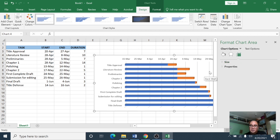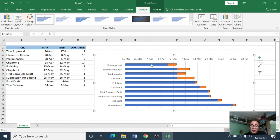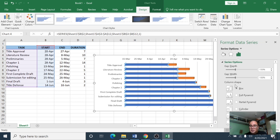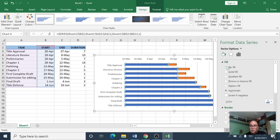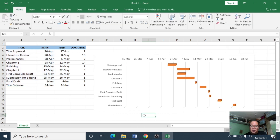Close the format panel. Now we need to get rid of the blue bars, which represent the start date portion and are not an important part of the Gantt chart. To do that, click one of the blue bars, right-click, and go to Format Data Series. In the Format Data Series pane, click Fill and then select No Fill.